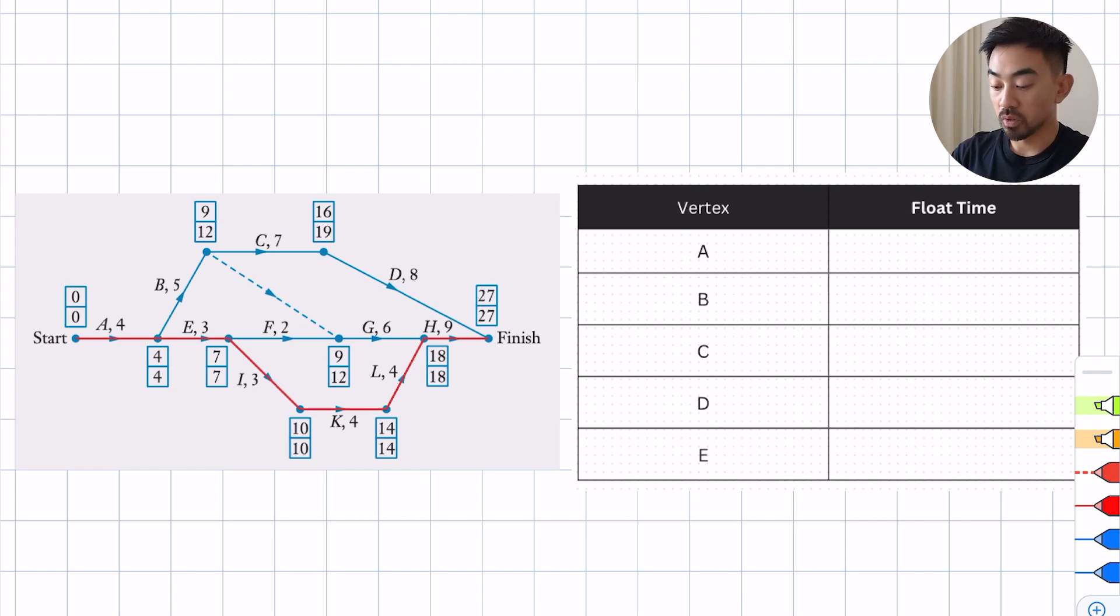For example, you can see on the left hand side I've got a network which has got its forward scan, backward scan, and we're going to find the float times for these vertices. So float time basically, well the formula to find it, is the latest start time of the next minus the early start time of the previous minus the activity time.